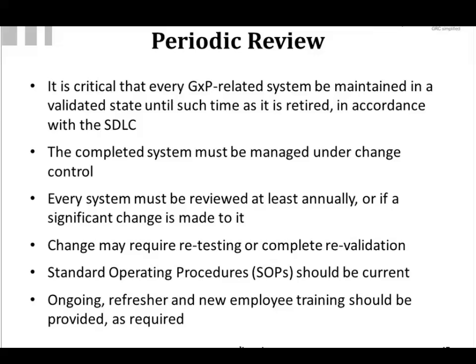Typically, an organization has a change control committee of some type that meets periodically and looks at requests to modify the system. And in doing that, they will determine which ones will or will not be included. If a change is approved, then under change control, you now have a case where you have to evaluate what that means in terms of impact on your test results.